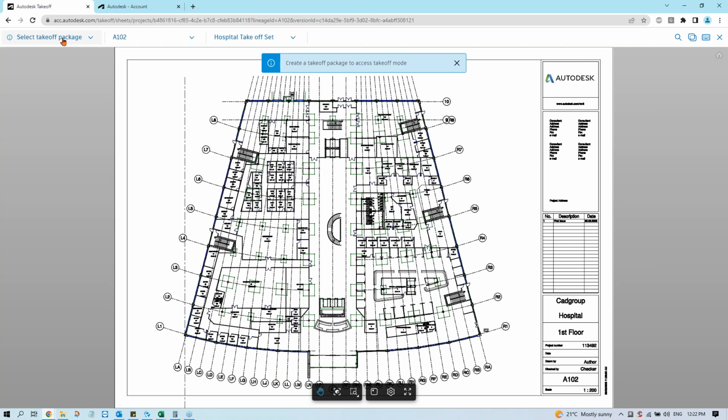They will be more than happy to know the scope of their work, and you will also have a furniture series, and then a wet area sanitary package, and internal finish plans. The reason we have all those different series of drawings is that they are split out by trades. Different series of drawings go to different trades, and that's why we call it trade package documentation, right?